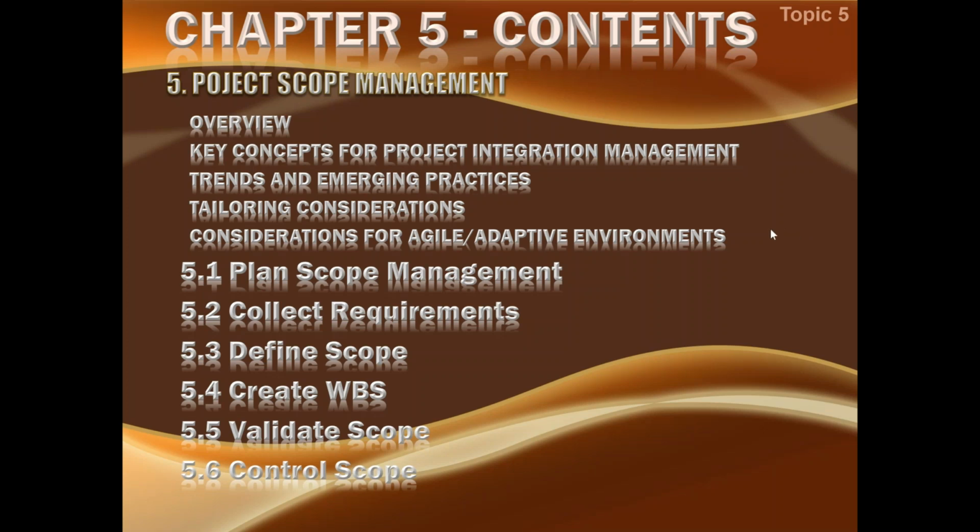So you all have heard the reason. First of all, yes, there is a scope in initiation, but scope management knowledge area does not come into play because that scope is encapsulated into the charter, and the charter is basically the responsibility of integration management. Though there might be a little rollabout scope, that scope is covered by integration, and as such, scope management knowledge area individually does not come into play in initiation.